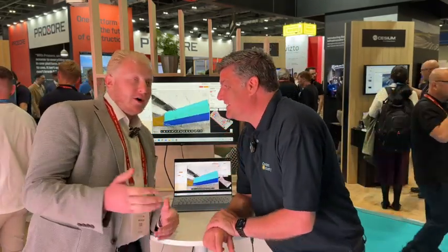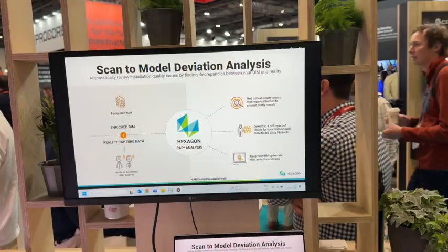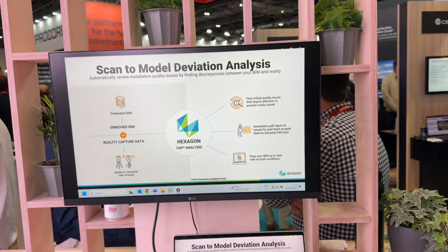Yeah, great. So I'm here with Hexagon Construction Analytics Portal. Essentially that's dealing with our deviation analysis. On that particular project, there was a huge bit of plant that was being installed and it was manufactured off-site. This bit of plant came to site and, exactly as you said, the valves that were meant to be coming off of that were completely installed the wrong way round.